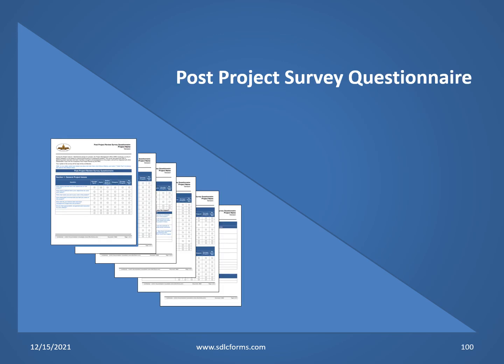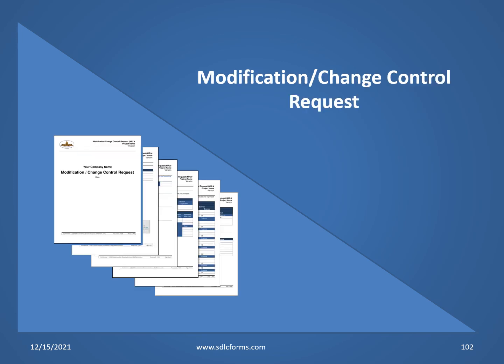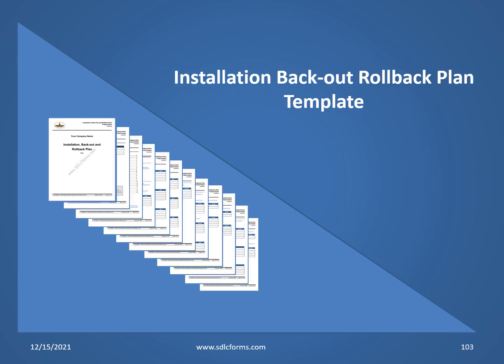Upon completion of a project, the Project Management Office, PMO, conducts a survey to gather feedback on the project to improve performance on subsequent projects. Upon completion of a project, good practice is to assess how you did on a project in conjunction with a Lessons Learned report. Used to review system application change requests to evaluate and approve technically sound and secure changes to the production environment and to limit potential impact to business capabilities.